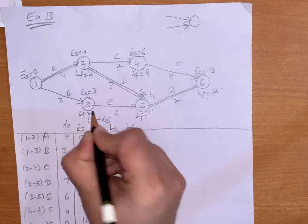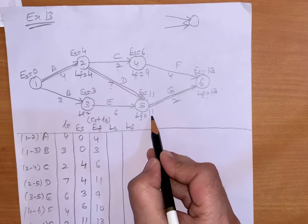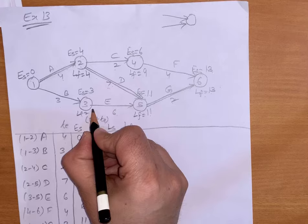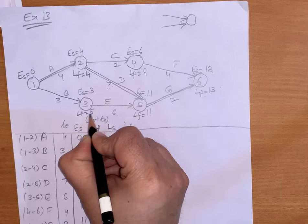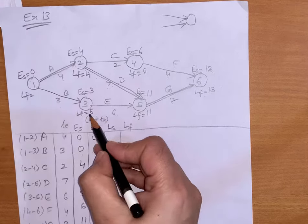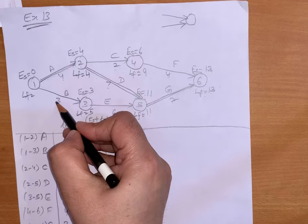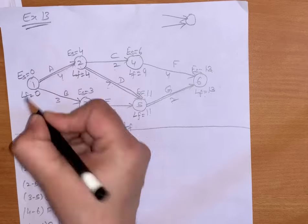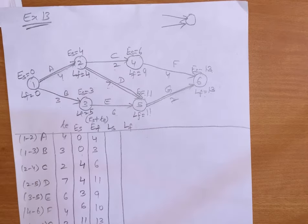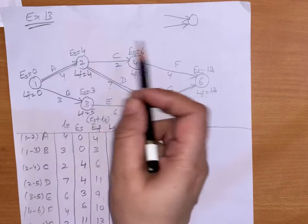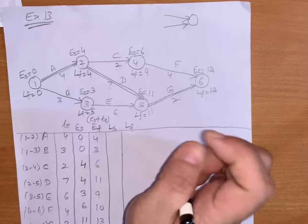LF for event 3 will be 11 minus 6, which is 5. LF for event 1 will be 5 minus 3 equals 2, or 4 minus 4 equals 0 — so we take the lowest one, which is 0. If LF for the first event is 0, it means we have done it correctly.